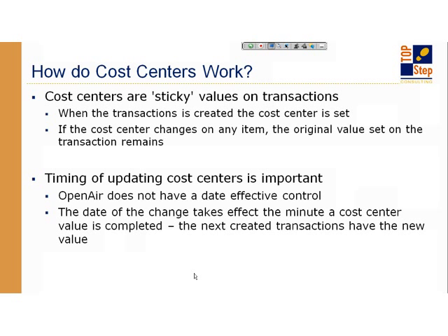So the good and bad news of the cost center is it's sticky, but there's no date index that you can control. The minute you change it is the minute that the values going forward would inherit the new values, and the values historically would have the old value on it. And if there's any kind of delay in paperwork, or we all know, the day that you transfer is not necessarily the day that the data gets updated, you may have a little bit of a data integrity, a reporting problem. You may have some roll-up cost reporting problems.